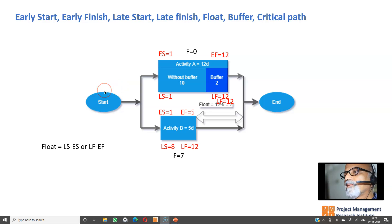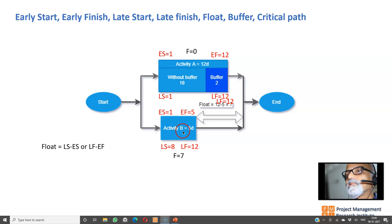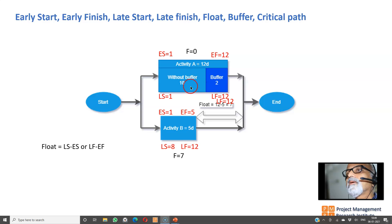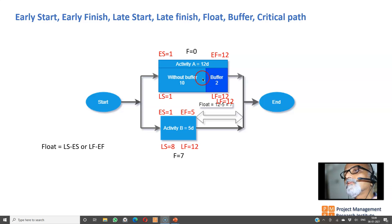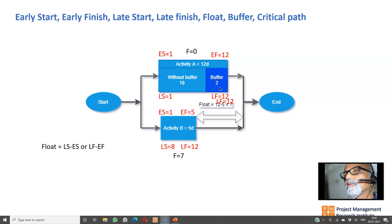Let us consider a very simple project with just two activities. Activity A has a 12-day duration and Activity B has a five-day duration. Within the 12 days of Activity A, 10 days is the actual time required, and two days is buffer — buffer means things can go wrong, so they put two extra days for contingency. Actual time required is 10, two days is buffer, together the activity duration is 12 days.